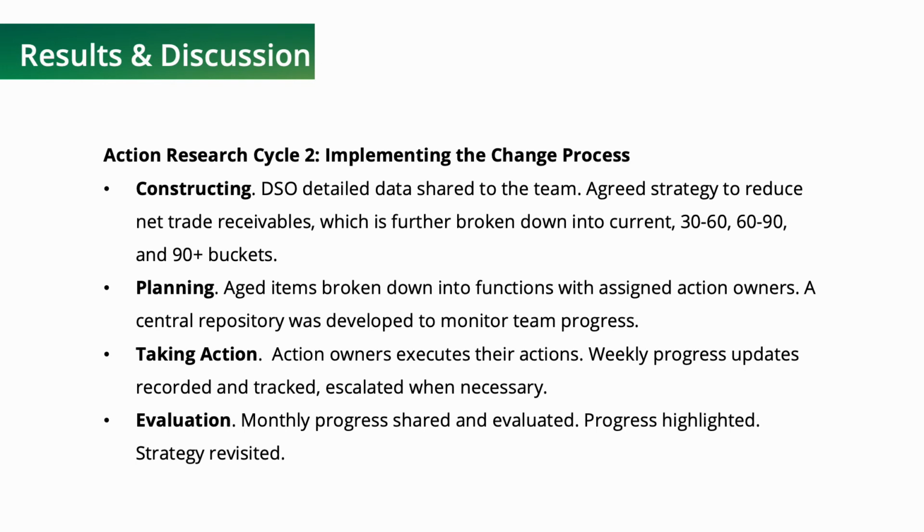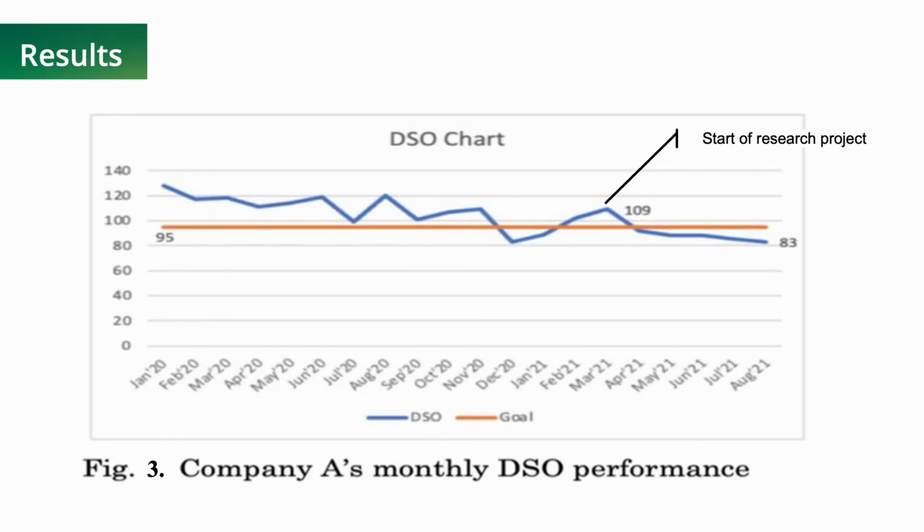Finally, during the evaluation stage, the project lead and the finance lead evaluate the weekly progress updates and analyze the monthly DSO data. The team progress and accomplishment are highlighted, and when necessary, some adjustment in the strategy is adopted. On to the results.